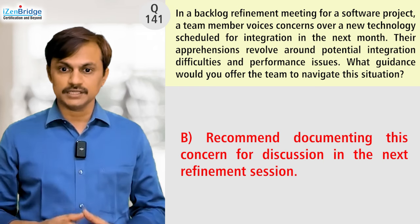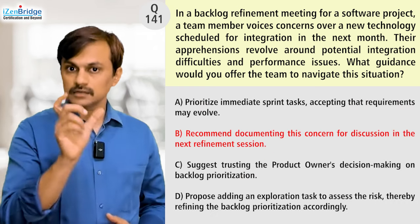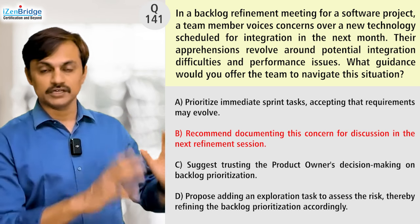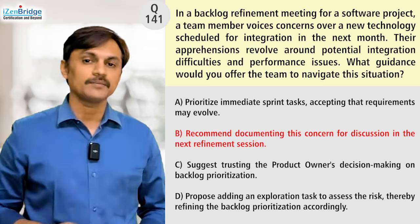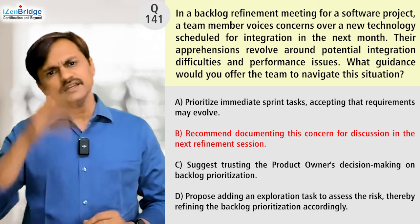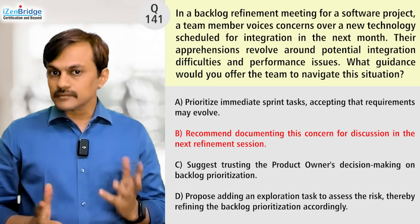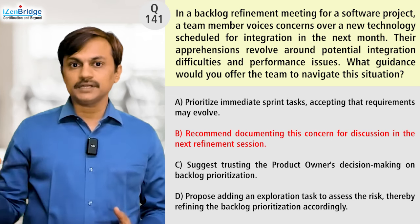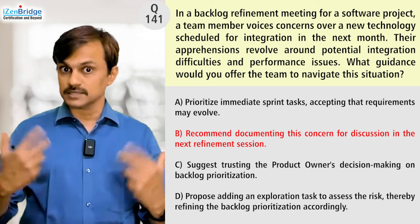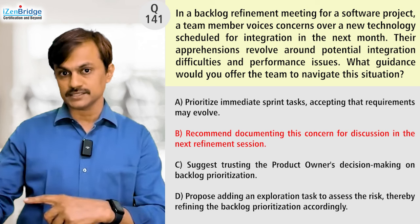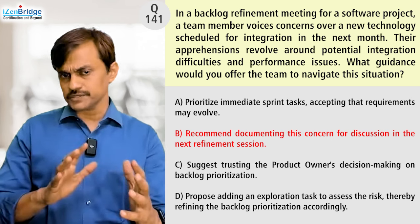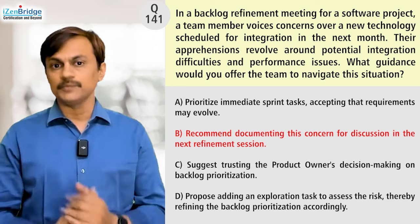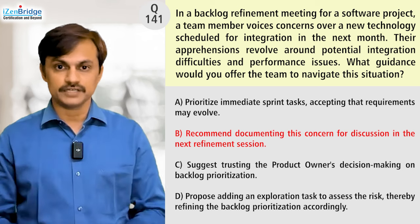Option B: recommend documenting this concern for discussion in the next refinement session. I like the documentation portion — putting it in a risk register, an information radiator, or on the Kanban board. However, deferring it to the next backlog refinement meeting looks like avoidance. There's no clear indicator that we need more information before acting. It's a candidate option, but we want something better that doesn't avoid the issue.